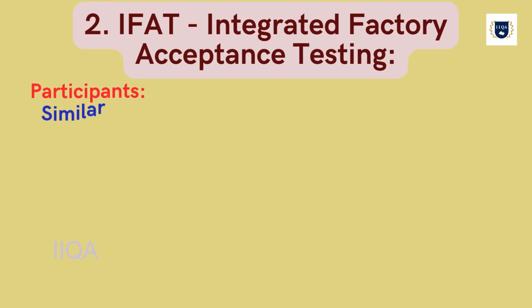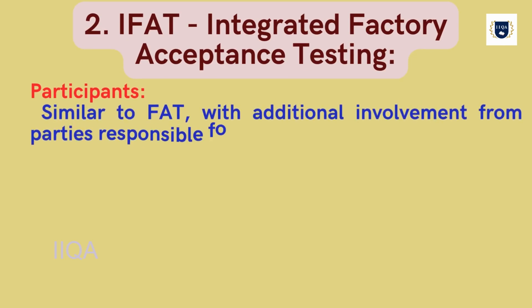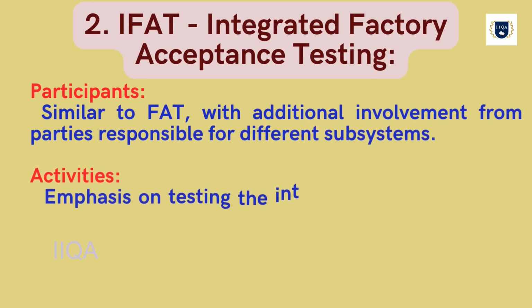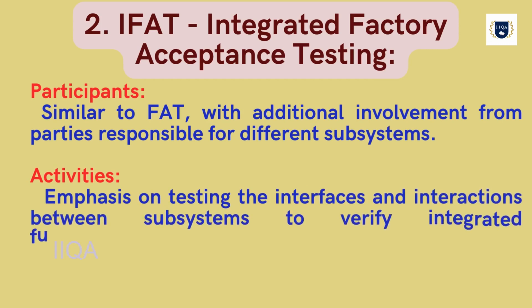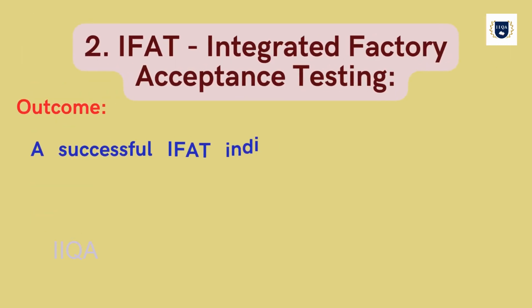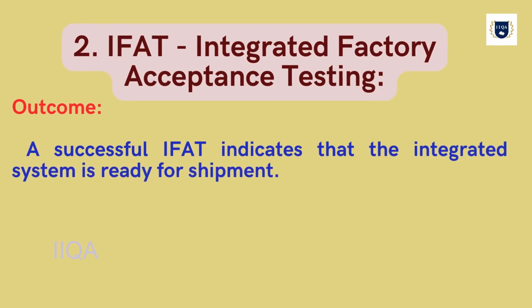Participants. Similar to FAT, with additional involvement from parties responsible for different subsystems. Activities. Emphasis on testing the interfaces and interactions between subsystems to verify integrated functionality. Outcome. A successful IFAT indicates that the integrated system is ready for shipment.